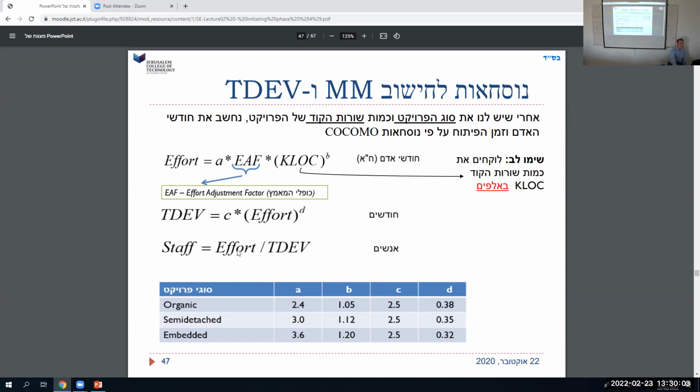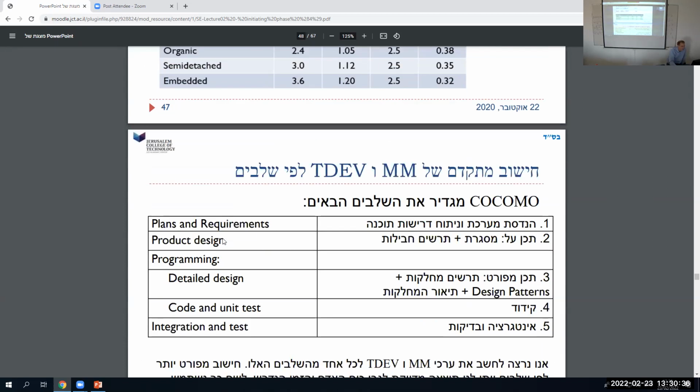Now, if I take the man months and divide it by the months, what am I going to get? The months cancel each other out, and I'm left with men or people. So the staff, how many people I need. And if I get a staff of 8.5, what does that mean? It means 9. I can't hire half people. Maybe I can hire an orangutan. Part-time, I could hire part-time, right? But in general, we round up. In this course, we'll round up.